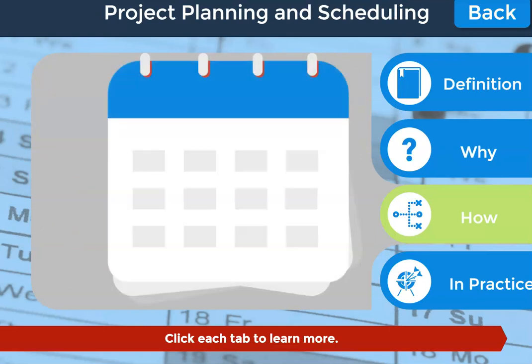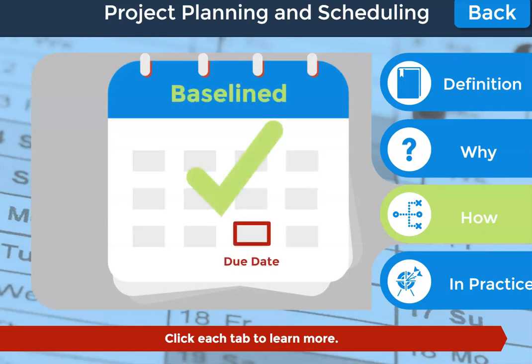Once the schedule has been fully developed, it is included in the project management plan. It is then said to be baselined. Best practice in scheduling allows for some slippage. If you've been given a fixed deadline, plan to meet it earlier and work back from that earlier date. Build some slippage or leeway into each phase of the project.